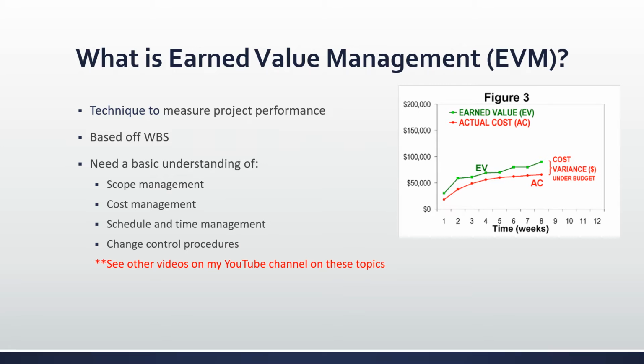And change control procedures. Realistically, every project changes something along the way. Your role as the project manager is to make sure that those changes are adequately assessed and incorporated into the schedule and budget. You'll need change control procedures in place to do that. So they're normally documented within your project management plan. And with a clear process for dealing with change, you can then adapt and update any of your metrics and plan to ensure that you are always tracking against the latest situation.